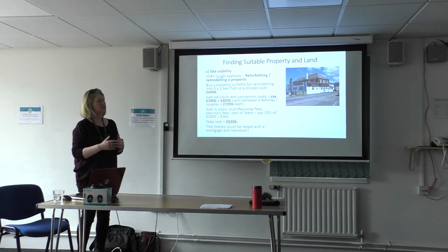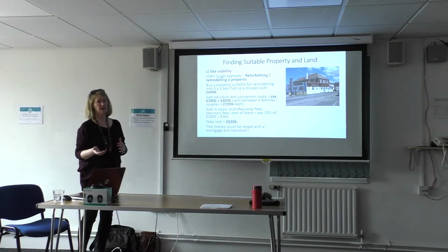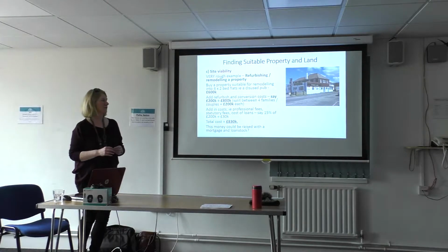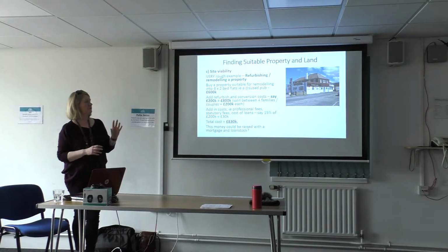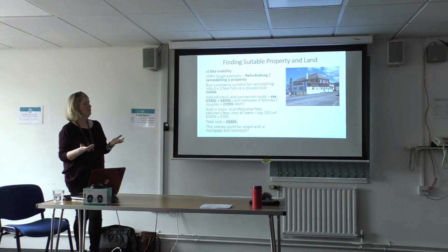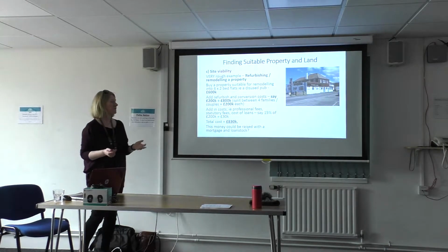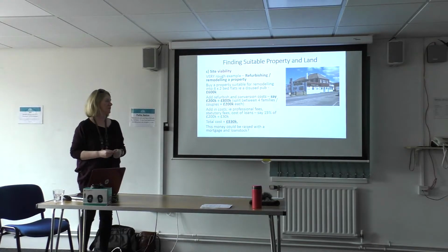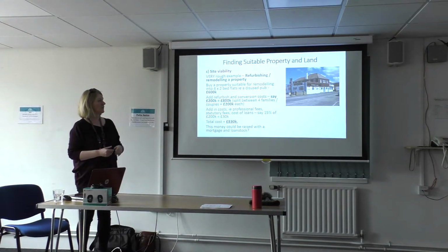But there's lots of examples of pubs being turned into flats and dwellings, so it probably isn't too contentious. The refurbishment and conversion costs, say 200,000, might be a bit less, hopefully, but I'm erring on the side of caution here. So say 800,000 split between, say, 4 families or couples, that's £200,000 each.